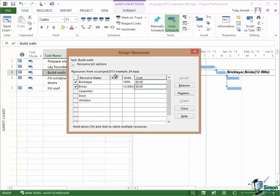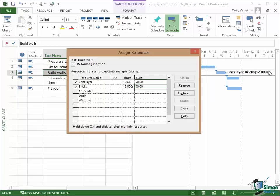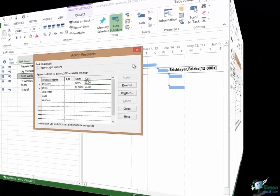Now you may be wondering what this RD column here is. The RD column is really outside the scope of this course but basically R and D stand for Requested and Demanded. And in situations particularly where resources are shared between different projects and possibly different project managers, you can demand specific resources or you can request resources. And when you're doing that then this column comes into play. But as I say that's pretty much outside the scope of this course. So I've now allocated 12,000ths of bricks. You can see on the Gantt chart there that that resource is named and I'm starting to build up a list of the resources that are needed on the Build Walls task within my housebuilding project.